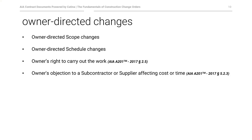This is an entry-level presentation, but we can expand upon that foundation with questions towards the end. On the lighter side, the term 'change order' has been given a bad rap in recent years — it's perceived by most people as negative. But a change order is just an extension to the contract, signed by all parties, memorializing a change, even if it's at no cost. It could be a no-cost change order, but we need to document the change.